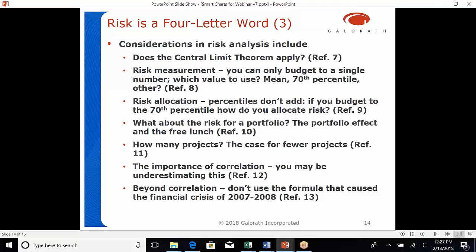But I think you may be underestimating this, because we often don't have a lot of data to base this on. So I advocate that we use a robust approach, which would be to minimize how wrong we are when we are wrong. And because we're usually making an assumption with this, we likely are wrong. If you do the analysis to figure out what a robust approach is, it's a much higher value. It's more like 60%, and that's what I advocate for default correlation value in the absence of other information.